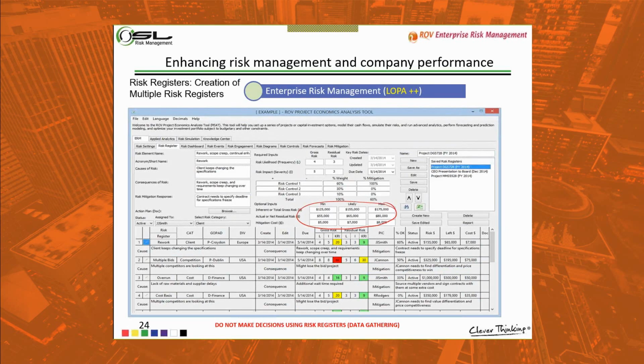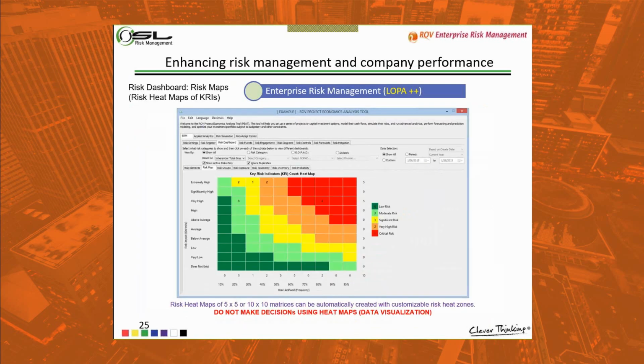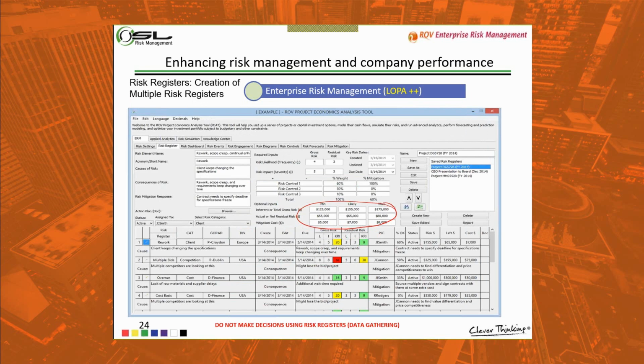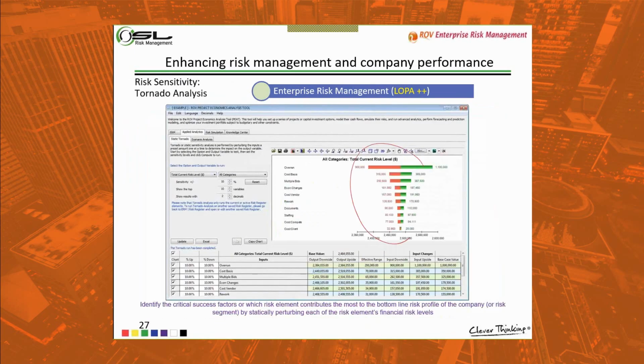Okay? That is important because the heat map is just categorical. It's classifying risk by categories. That is not giving you the quantitative exposure. So here, based upon these numbers, minimum, maximum, most likely, worst case, best case, and so on, we are able to generate ranges of information, data points around those numbers to create this profile, running tornado analysis and any other sensitivity analysis method we have.